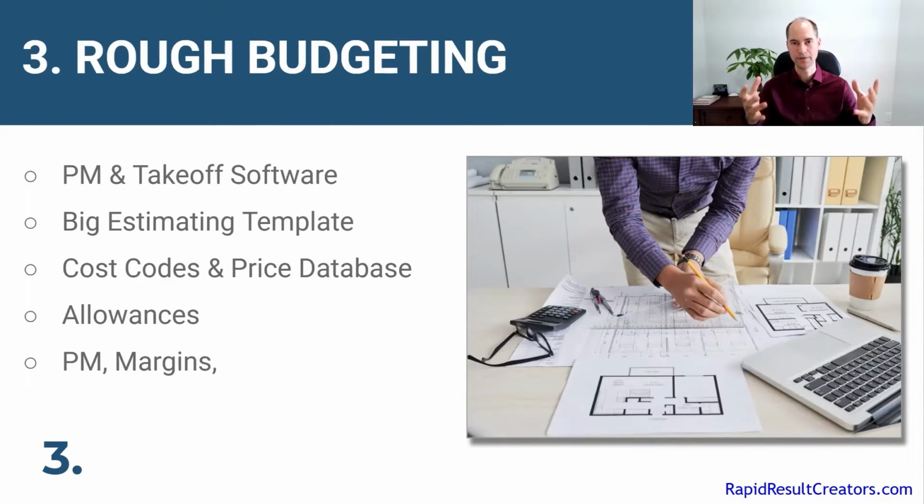And the way to do this is, how many hours per day does it take you to manage a project? Talking with the client, calling the trades, doing site meetings, meeting inspectors, doing your own quality checks, all this kind of stuff, right? So is that 1 hour, 2 hours, 3 hours a day to manage a project? Make sure you build that into your estimate.